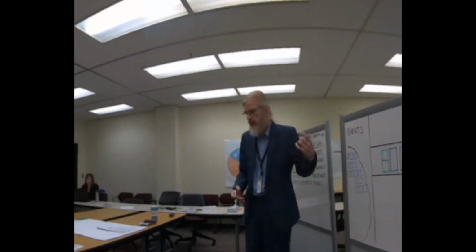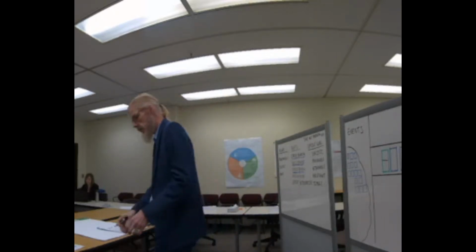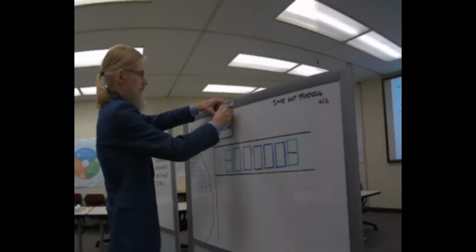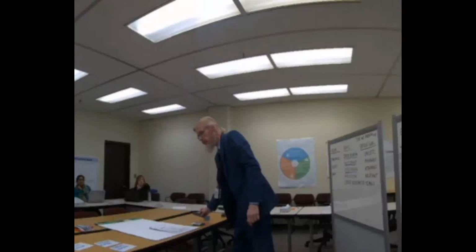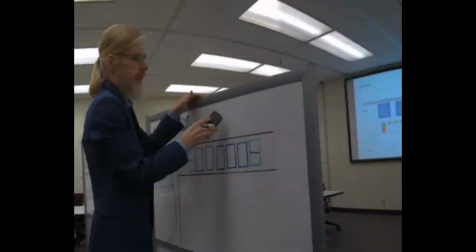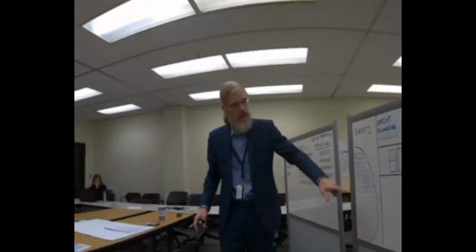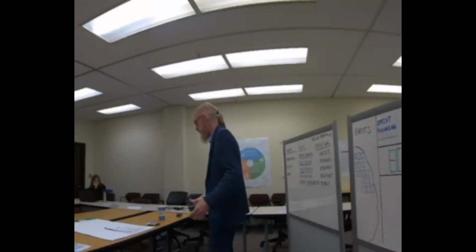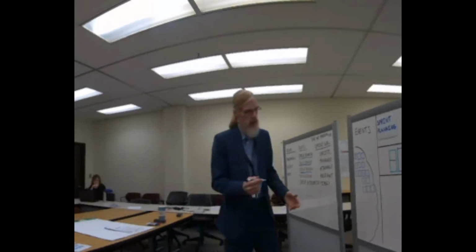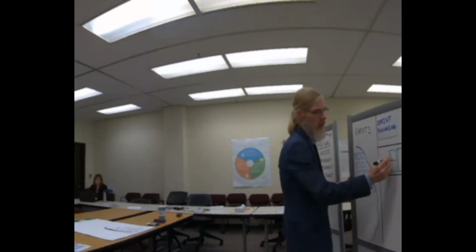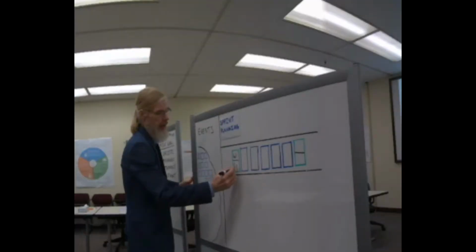Okay? And the first event that we're going to discuss, and it is the topic of this module, is the sprint planning meeting. Now the sprint planning meeting, we did talk a little bit about this yesterday, but this is on the front end. This happens before we begin sprinting, and it has two parts to it. The first part is the what, the second part is the how.